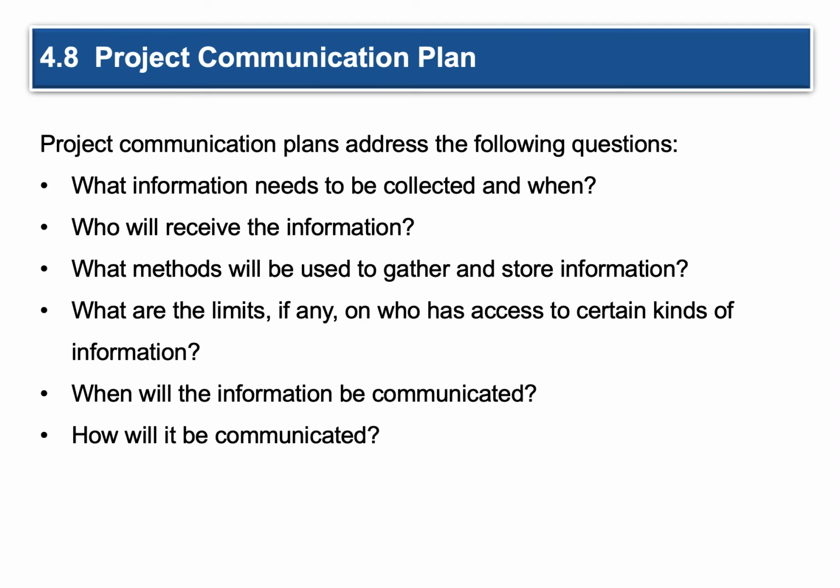Project communication plan that addresses the following questions. What information needs to be collected and when? Who will receive this information? What methods will be used to gather and store information? What are the limits, if any, on who has access to certain kinds of information, and when will the information be communicated, and how will it be communicated?